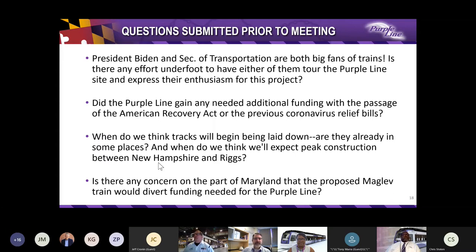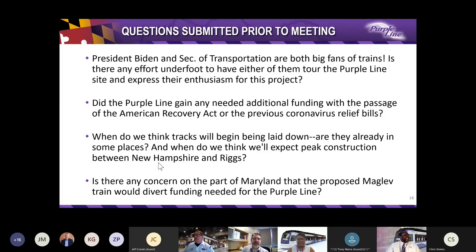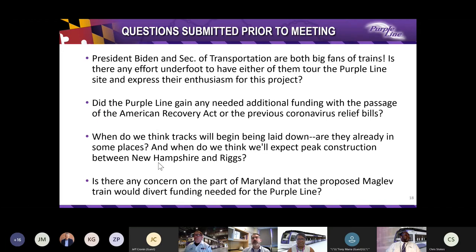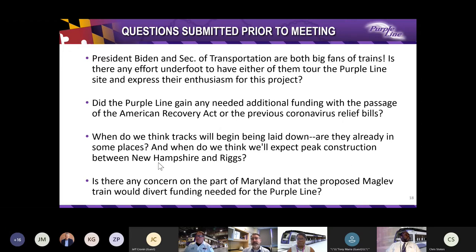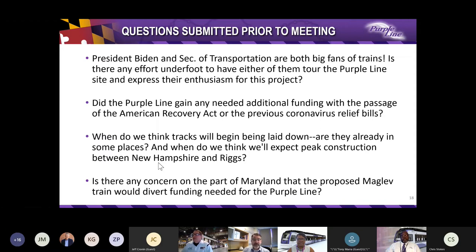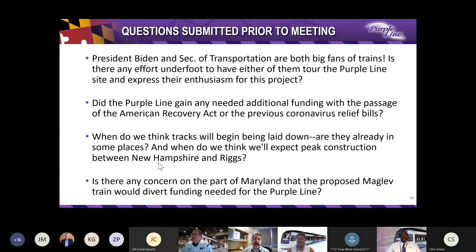Next question. Did the Purple Line gain any needed additional funding with the passage of the American Recovery Act or the previous coronavirus relief bills? Well, as you know, since its inception, the Purple Line has had federal financial support. In August of 2017 in Glenridge, Governor Larry Hogan and Secretary of Transportation Elaine Chao signed a $900 million full funding grant agreement, locking in the federal dollars for the project. That funding remains intact. The American Rescue Plan Act of 2021 apportioned an additional $106 million for the Purple Line.